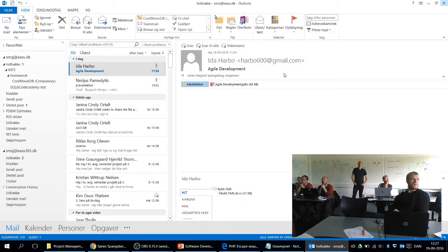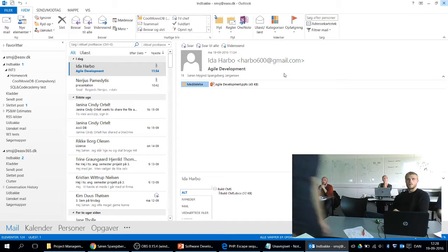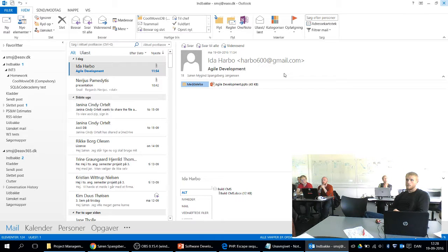Now, what you do then is you take the different smaller tasks on the release backlog and turn that into sprints. Sprints we have talked about, but let's just go through it again. It is a very small list of tasks that are connected in some way, which you then work on very consistently in order to get it done as quickly as possible. Now, a sprint can take different lengths of time, but the customary method is 2 weeks, as we discussed.